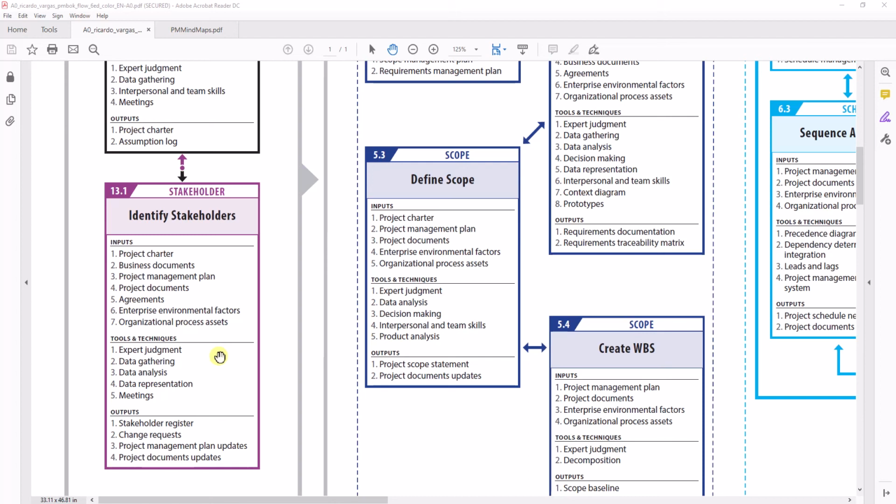Fine, Bhuvan. So in the power interest grid, you map what level of interest the stakeholder may have, how much he or she is interested in the success or failure of the project. On the power side, you say how much power he or she has in influencing the project, in killing the project or in helping you. Can they help you, or are they simply powerless, can't do anything?